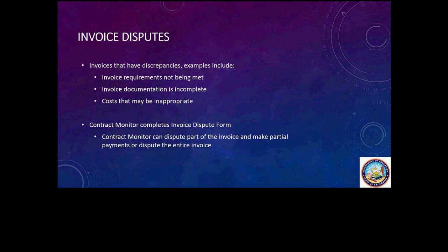And there are a couple of ways that there can be a dispute. The CDE contract monitor has to complete the invoice dispute form first, and they can dispute part of the invoice and only pay a portion of the invoice, or dispute the entire invoice.